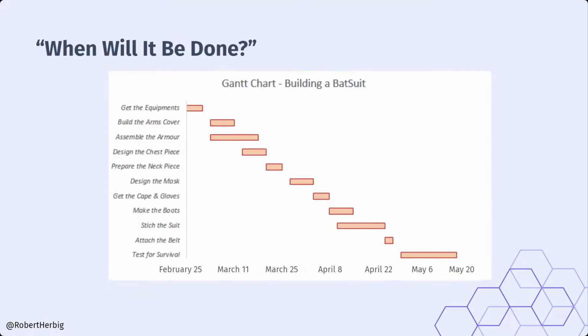So I think we can all look at this Gantt chart and understand it's projecting approximately May 20th. But one of the critical things that's missing is it implies a certainty around May 20th. It implies that it will be May 20th. There's no good communication mechanism in this Gantt chart around uncertainty, around where it might actually land, what the odds are. Because I think we can all look at May 20th and say, well, clearly it's not going to be on exactly May 20th, but how big are the error bars? How big is the variance? These are all some of the critical missing components.